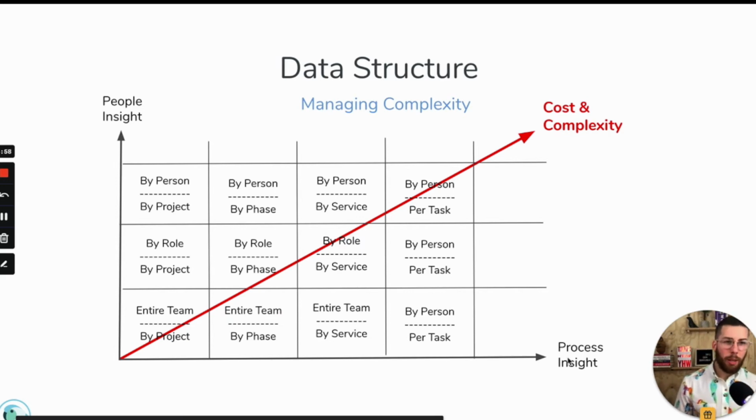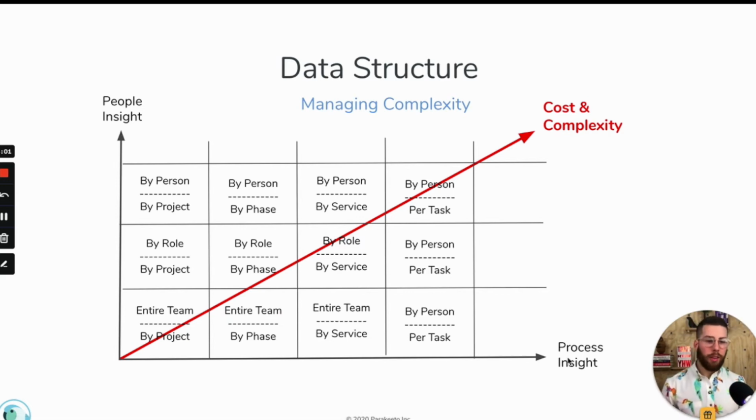So depending on how you set up your contracts with your clients, maybe you have a contract. Within that contract you have different projects. Within different projects you have different deliverables. Within each deliverable maybe you've got design and development and all these different services. Then within those maybe you have tasks, or you have other deliverables within that, and then within those deliverables you have tasks, and then within each task you have subtasks, right? So you can see how, depending on how you set up your projects and what the cascading effect of that contract is, each level of granularity that you go deeper requires a more complex time tracking tool to even be able to support those things. And then it requires more and more detail from your team when they're inputting time. And that starts to increase complexity very quickly.